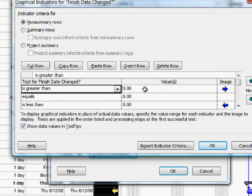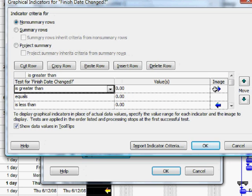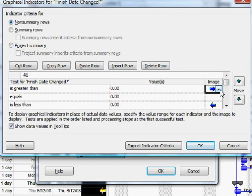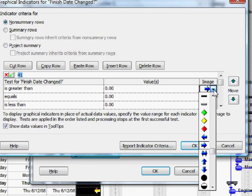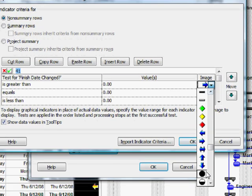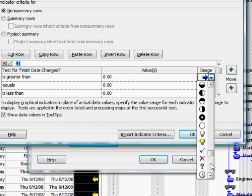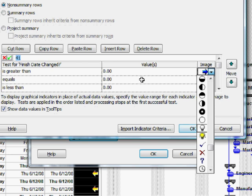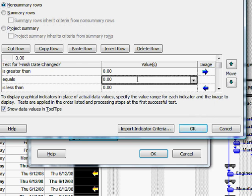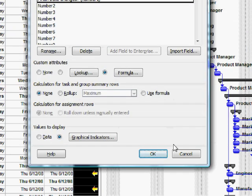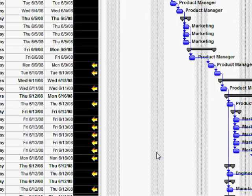If the result is greater than zero, in other words the date has slipped off to the right, then I've put in this right arrow. Notice that in Microsoft Project there are a whole bunch of different indicators you can choose from. For the condition that there's no change, just a blank. And for the condition that the Finish Date has gotten earlier, then I've got an indicator that shows that date has moved off to the left. So fairly straightforward to customize this field.